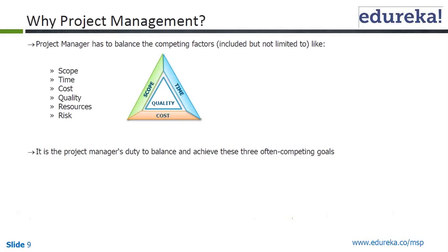It is easy, but everything has a cost and time, and in turn it affects the quality and increases the risk. Any addition of feature usually increases the risk. So if you are not taking a full, holistic view, then you are missing something, and essentially you are putting your team under pressure, so they may have to overwork, they will resent it, and there could be quality failures.